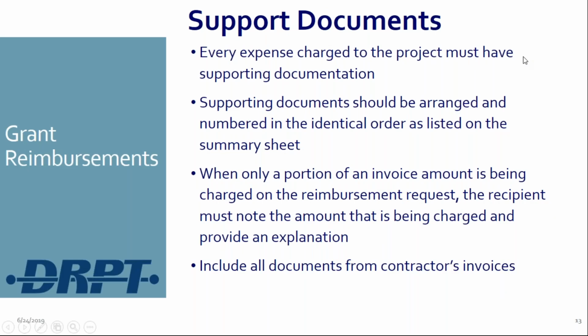Now we're going to talk about supporting documents that are needed for reimbursement requests. Now that you've got the summary sheet with the listing of every single expense you're charging, every one of those expenses needs some type of supporting documents behind it to show the expense, what it was, and what it was for. You should put the documents in order as the expenses are listed on that summary sheet. It just makes things easy for us to find, and we don't have to go digging around or calling you up to ask questions about it. So keep them in that order.